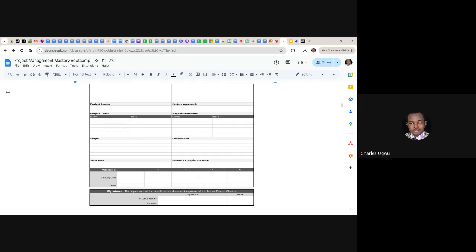So you can say in scope: blogging, video. Then you can say out of scope: shopping carts, e-commerce, or marketplace, because some people can just come. We see these days most of the companies that are into media or news are beginning to add shopping carts within their blog.